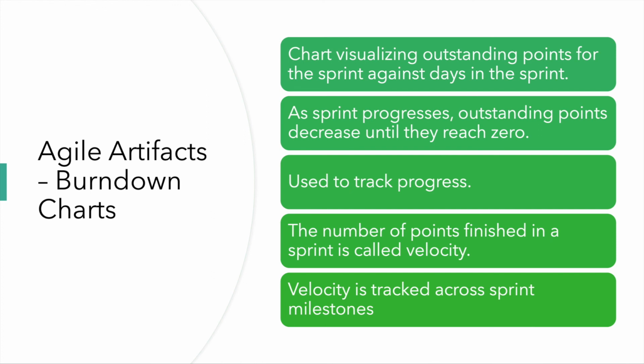Ideally the velocity should grow with sprints, because at the beginning of the whole project the team is not aware of the requirements clearly, or there are so many unknowns, so the team doesn't know what technical challenges it might face in delivering this project, and what kind of new requirement changes may come. You don't have the full picture at the beginning, so productivity will be low.